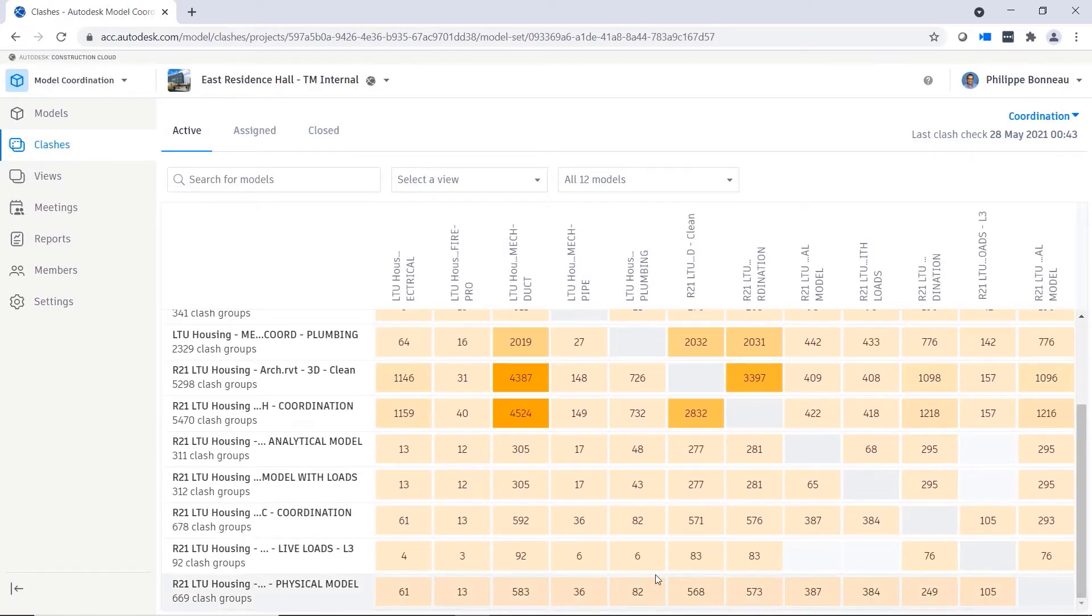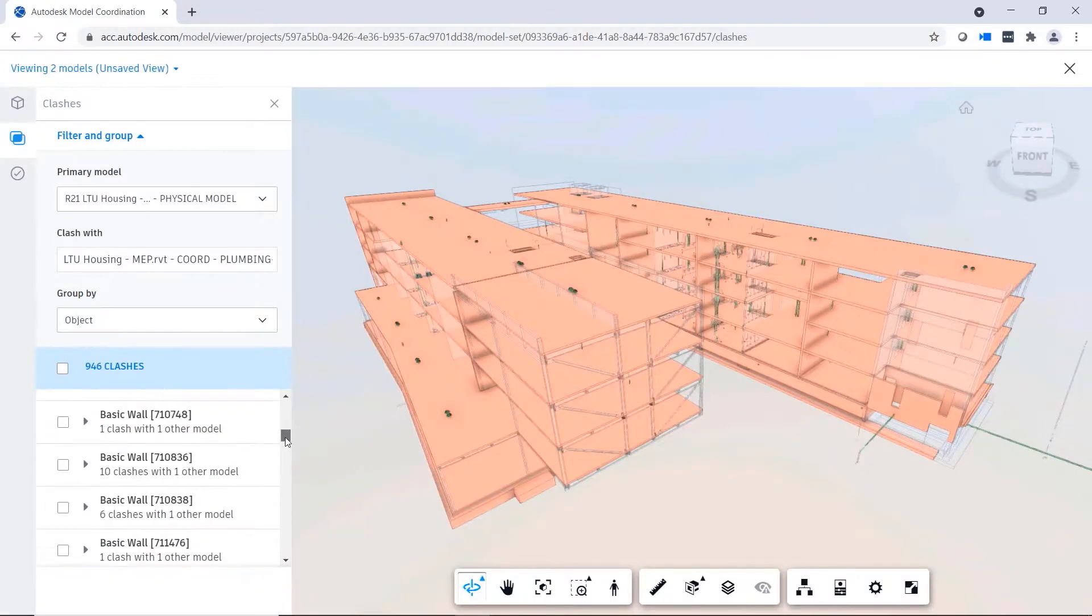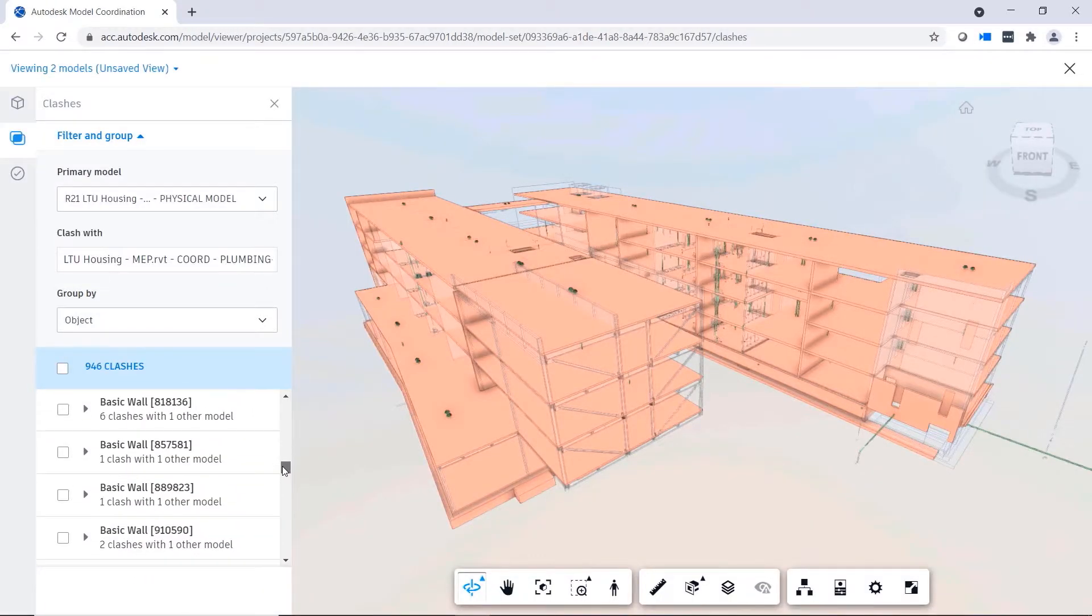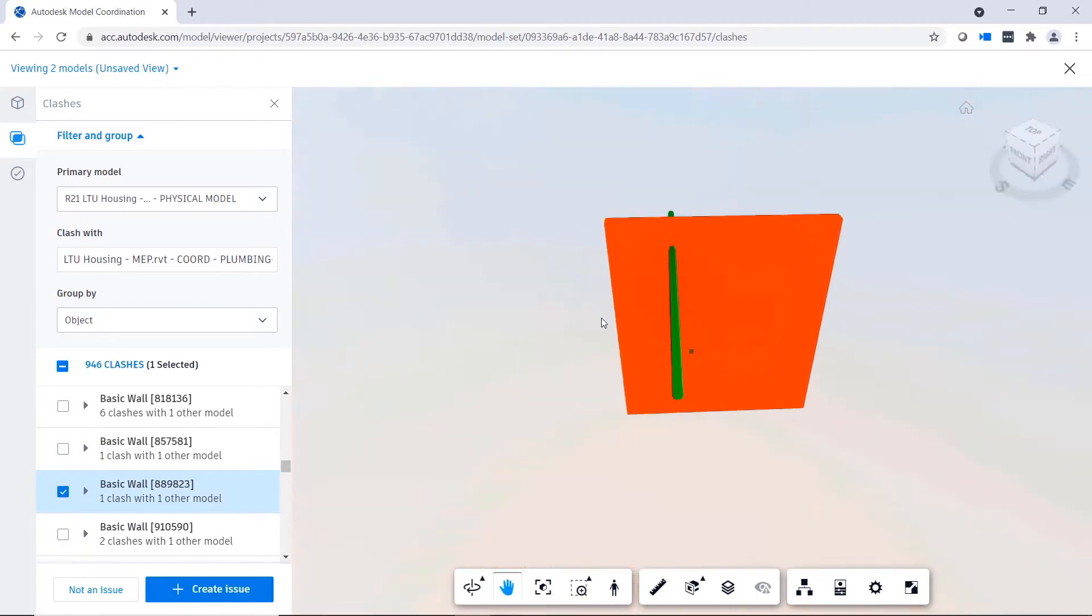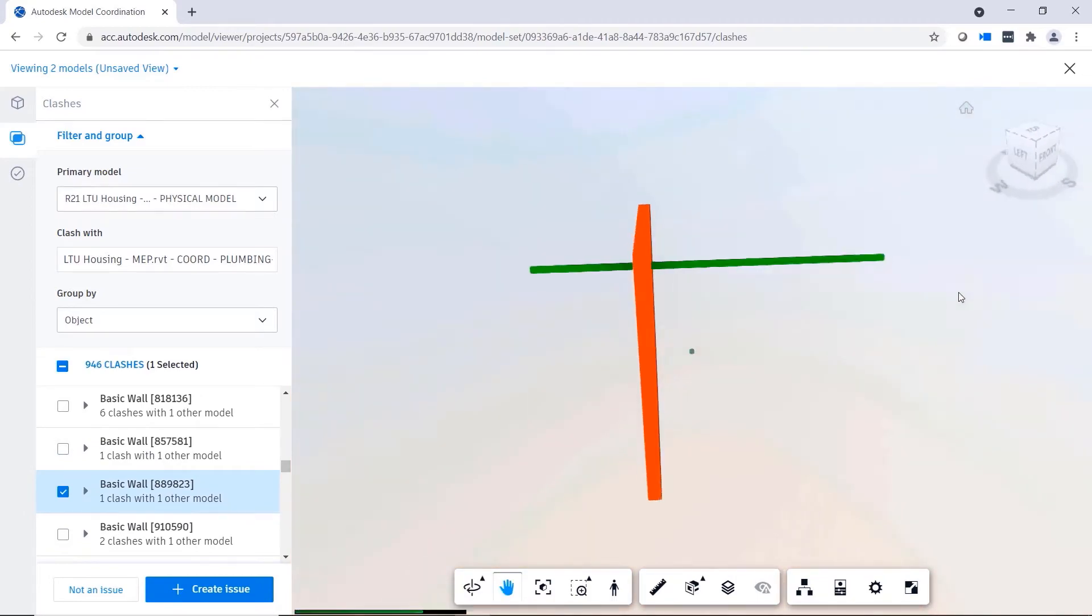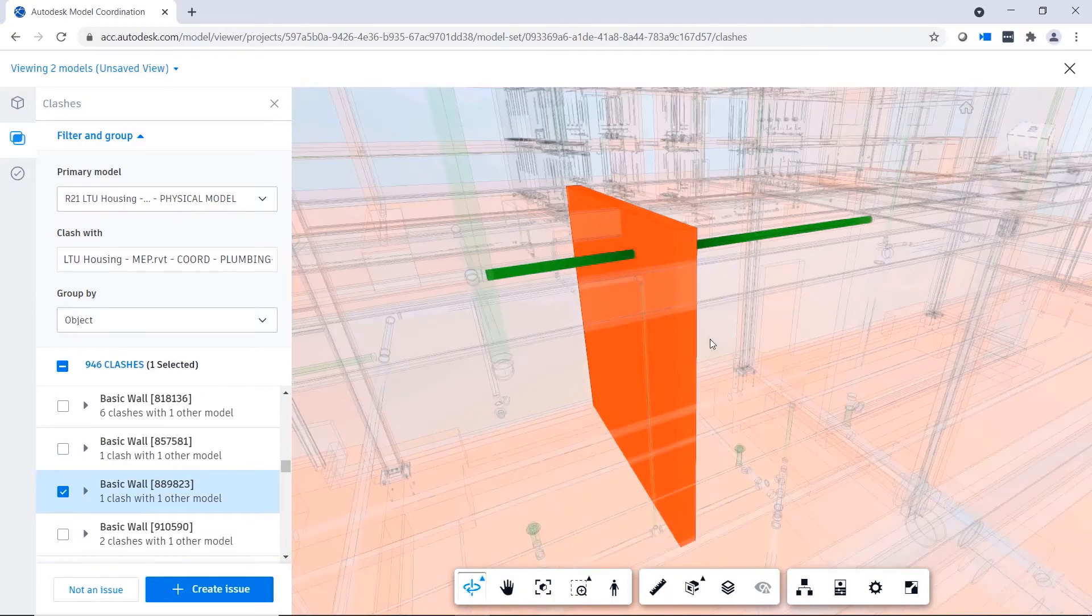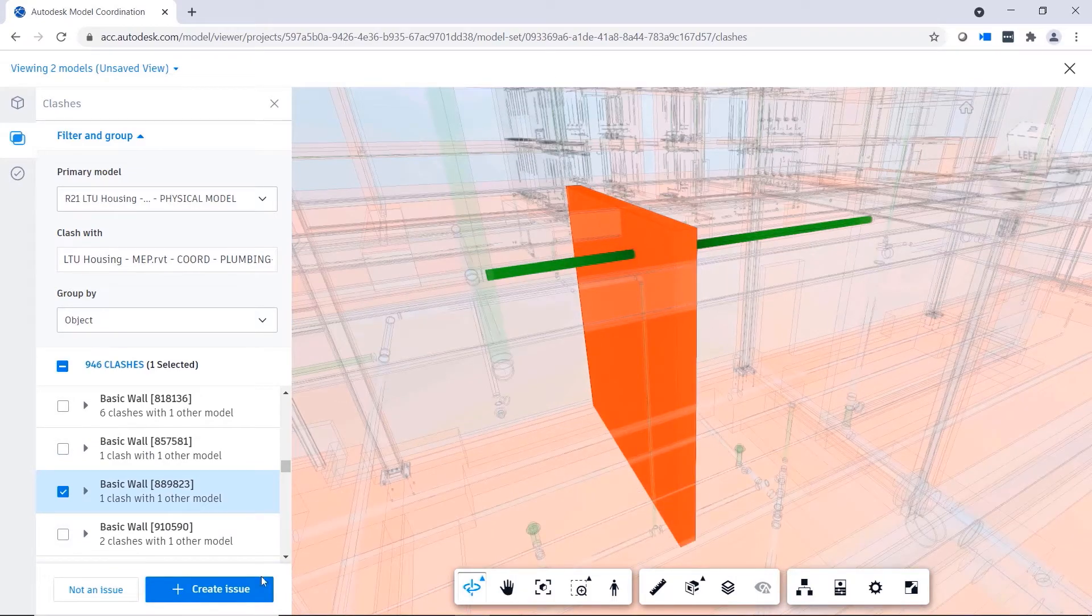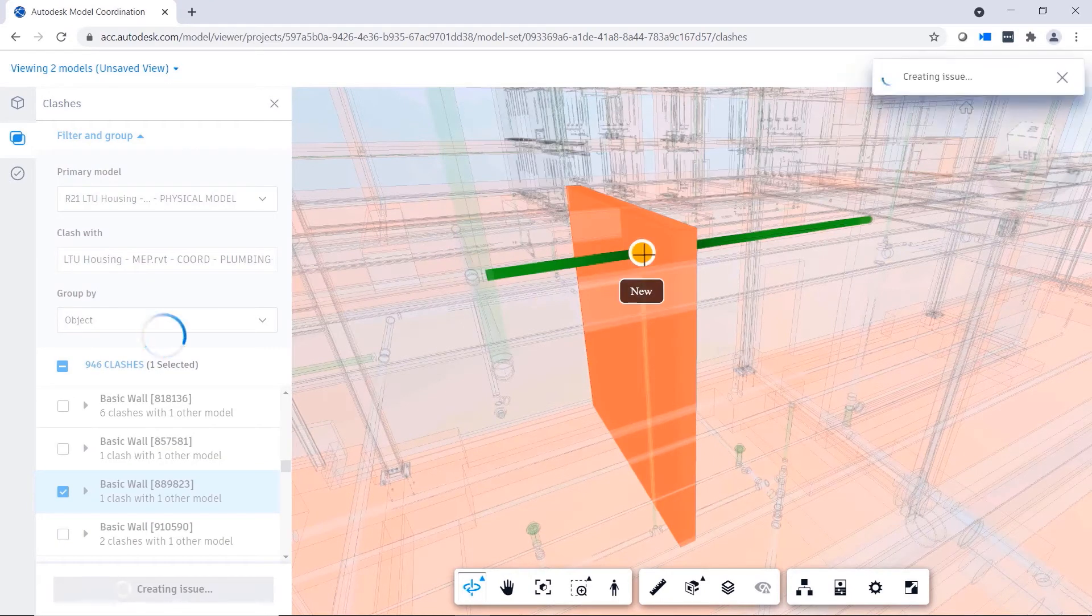In the model coordination module, included in both BIM Collaborate and BIM Collaborate Pro, automated clash detection features help you quickly identify coordination issues for models hosted on Autodesk Docs, enabling your project stakeholders to view, manage, and resolve model conflicts.